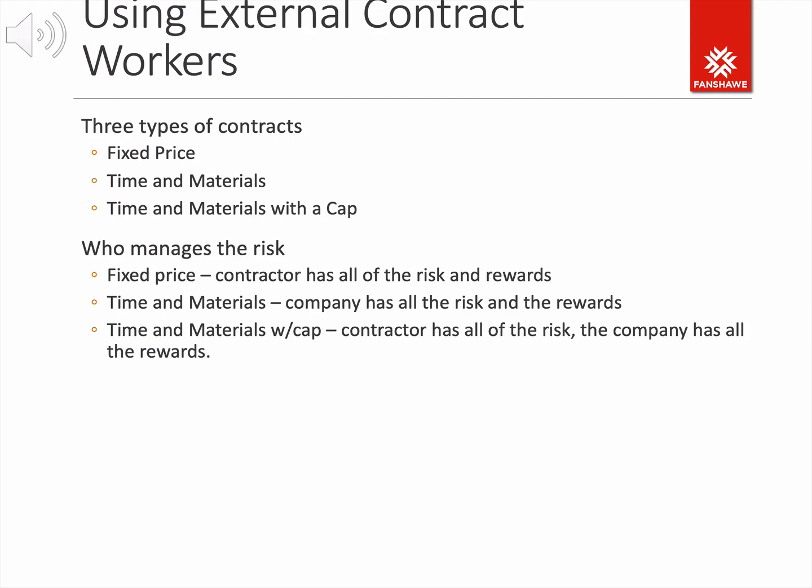So if they go out and estimate that it's going to take them about $8,000 to do this piece of work for you, these 5 requirements, and they will fix the price, then great, you can give them a contract and it's fixed price. If they can actually build it with less money, in less time, great. They get to keep the extra money that they made. But the beauty for you is that it really fixes the price. There's no variability in it. They can't come back and ask for more money later.